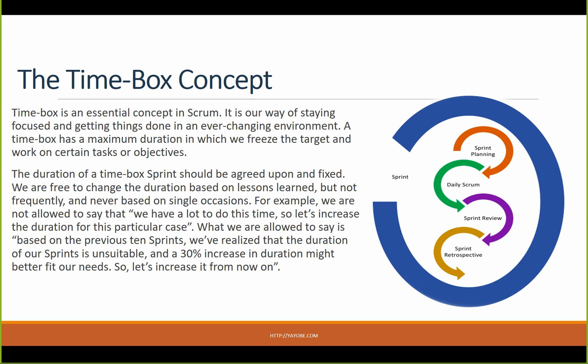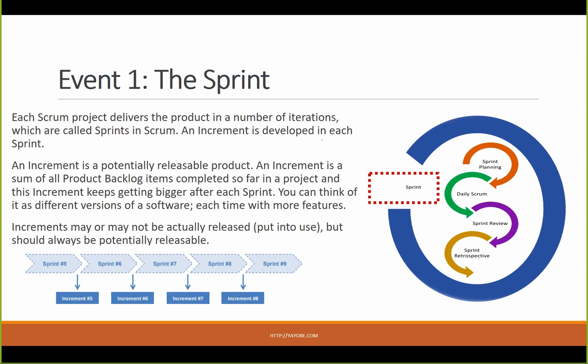A new sprint is going to run as a time-boxed duration of work. You start a sprint, you finish a sprint — you have to define when you are going to start and when you are going to finish. The duration is usually two weeks. You can do a sprint review or a retrospective at the end.